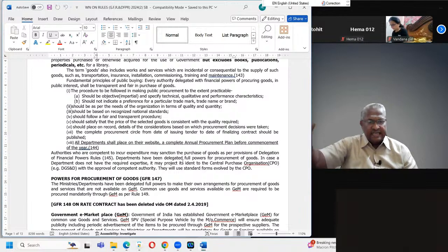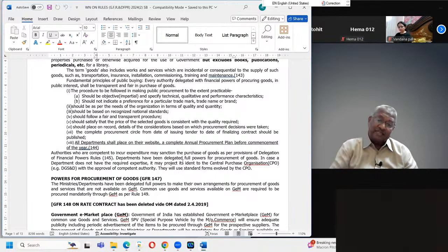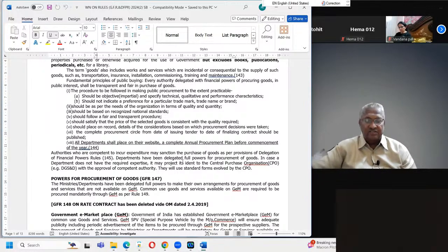उसमें ये ठीक है, ये ठीक है हमारे लिए, दिस इज व्हाट इज वांटेड. Then next one, yes, this is what is wanted. Third one, no, it is not according or as per our requirement, rejected. Then the fourth, rejected. Fifth, वो ठीक है. Then once all the quotation technical bids are opened, studied, then rejected को दूर रख देंगे. And not only that technical quotation rejected, but their financial quotations will also be removed.